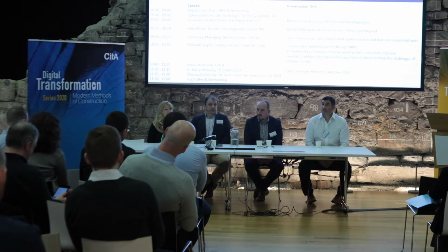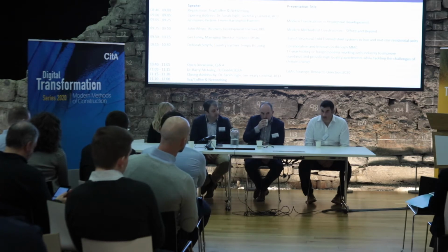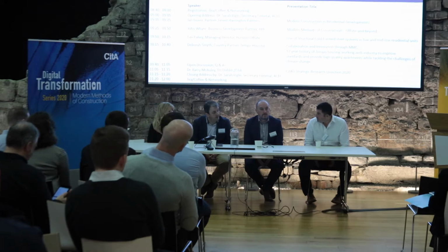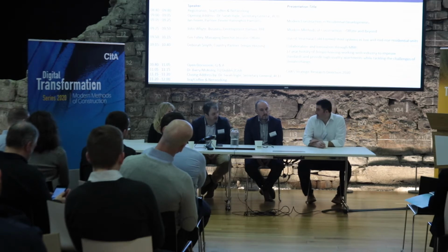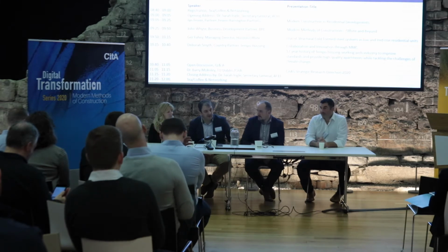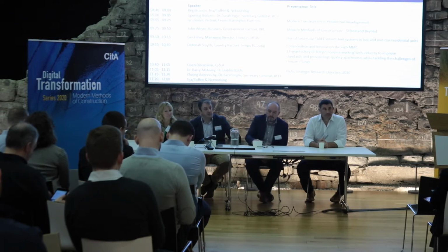So i.e. the M&E within a building, the external facade, your brickwork is done by someone else, and your boarding within the building. Like we would have been involved in a project many years back under Fusion, isn't it? That's it. In Waterford Castle, delivering I think 48 or 58 houses, and that was 12 years ago. That was a very successful project, and the houses are holding out very well. It was logistically challenging because it was on an island. So we had to physically get the frames on the little ferry that went to the island. But again it was the right product, offsite, because you were getting 2 units on a truck to go to site that had to be ferried over, as opposed to X amount of trucks for traditional. So it worked.